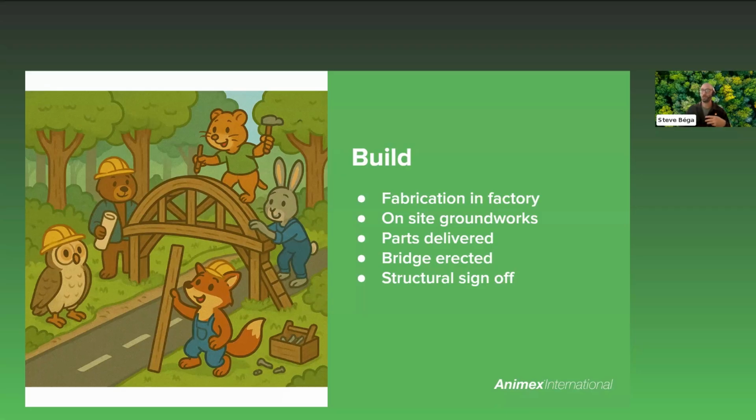So although we can provide and understand indicative costs at the start of a project for all the materials that are going to be used and ultimately make up the bridge or bridges themselves, this isn't really able to be confirmed or refined until the final design and approval stage. And then this would typically be agreed upon before fabrication.